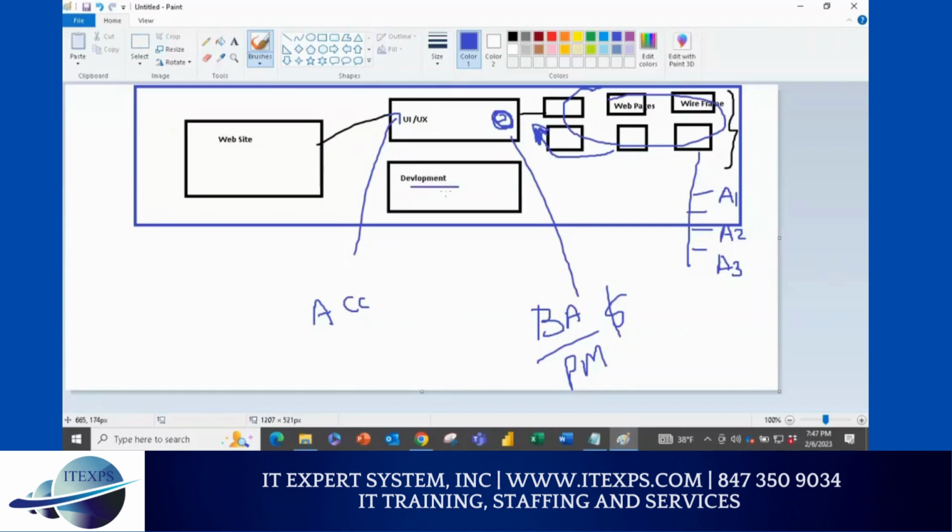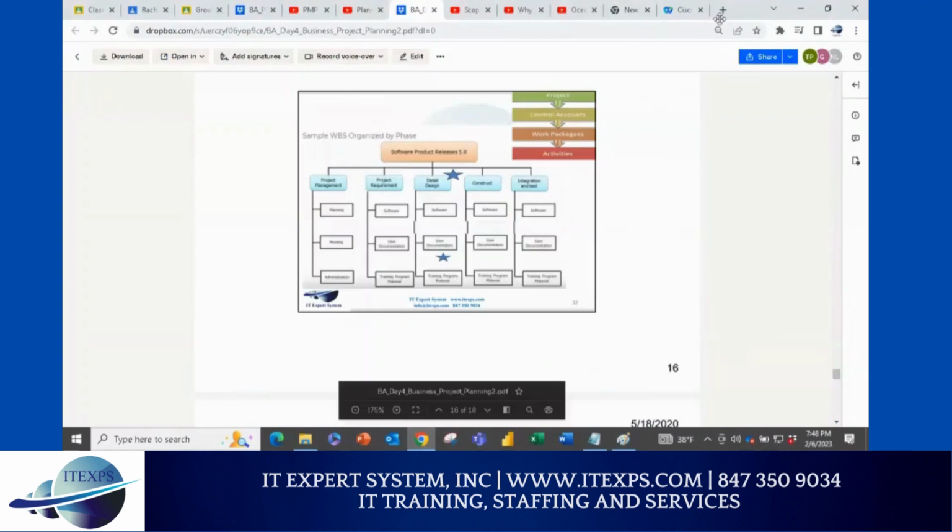Development, I'm spending this. Then what is the difference between category and that? Because we divided this in categories. Category is the language from the WBS perspective. But from the accounting perspective, this category is known as a control unit or control account. Basically, funding will be given based on these categories, subcategories. They will not talk about the website because the website is subdivided into these categories. For each category, you will say, I have planned this budget and I spent this much. Make sense?